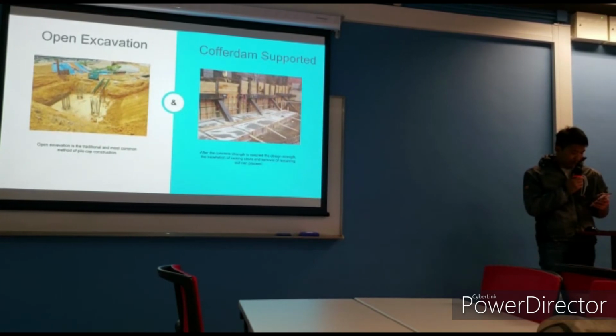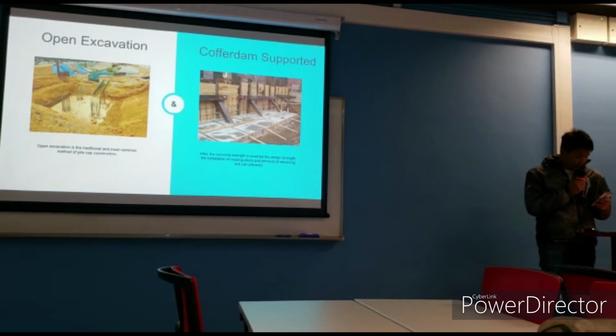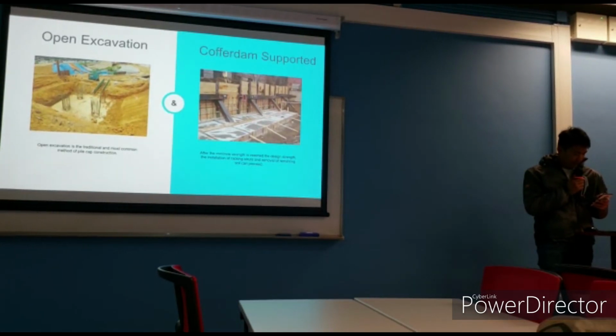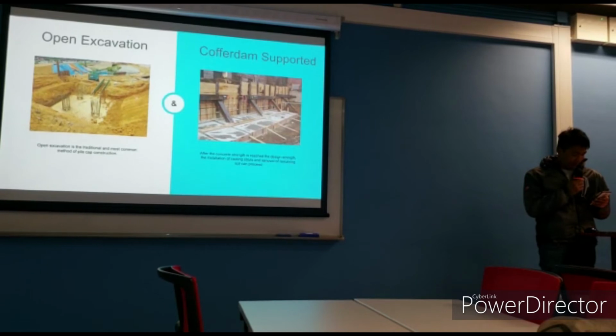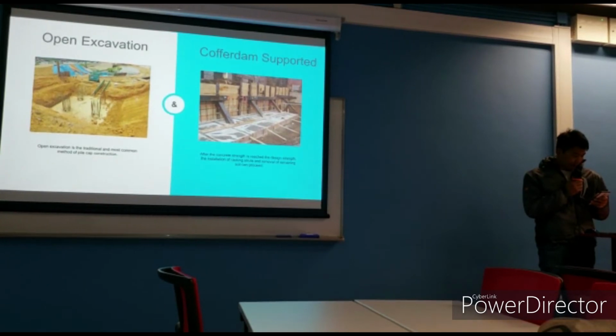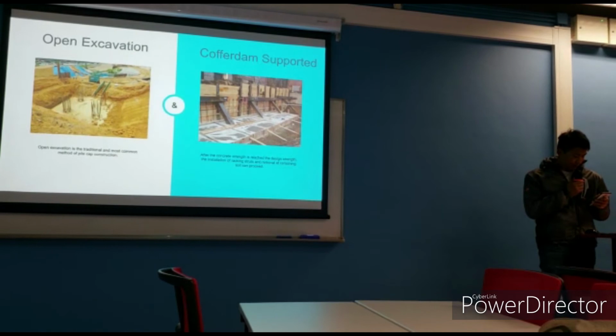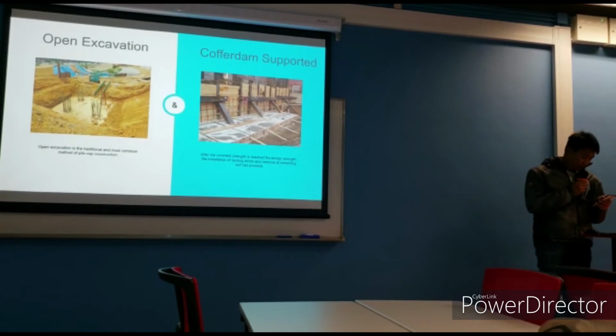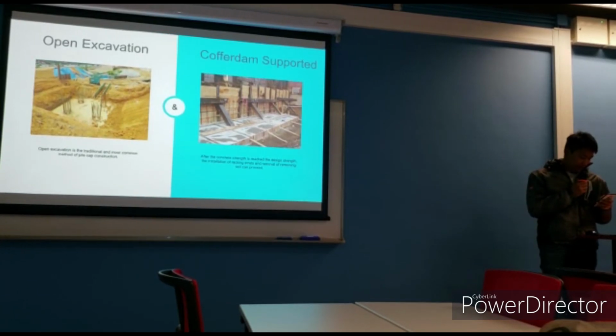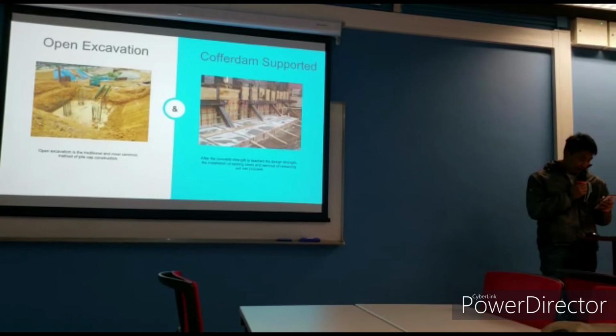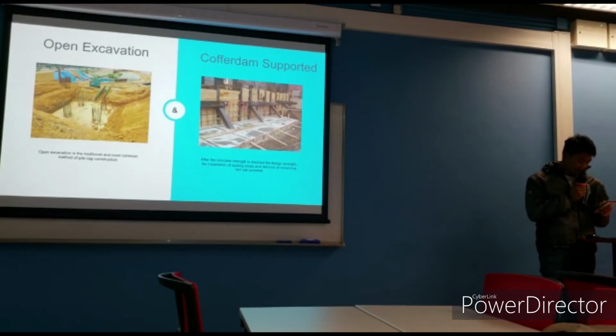Usually the compacted soils and backfill will be backfilled into the ground. Once the sheet piles are driven into the ground, the excavation of the pile caps located in the center can proceed to the desired level and remain enough soil to support the lateral load. Before the pile caps are cast, the casting bolt for the racking struts should be fixed into the pile cap reinforcement. After the concrete strength reaches the desired strength, the installation of racking struts and removal of remaining soil can proceed.